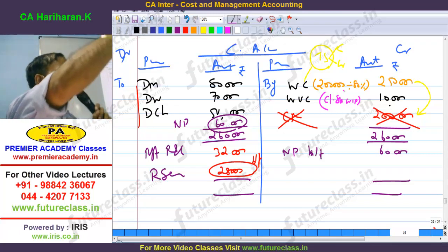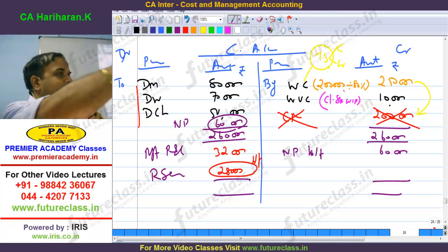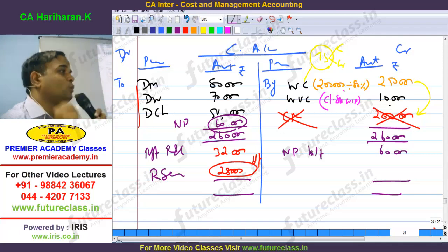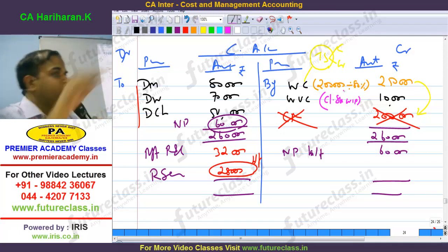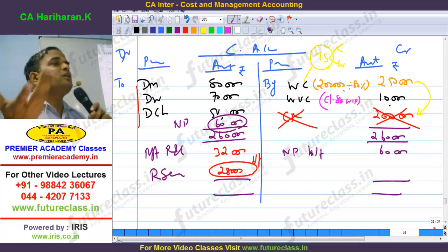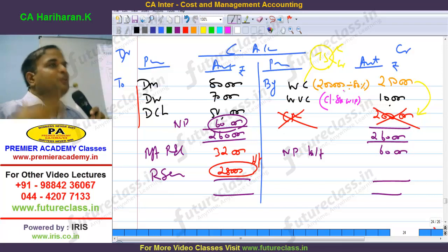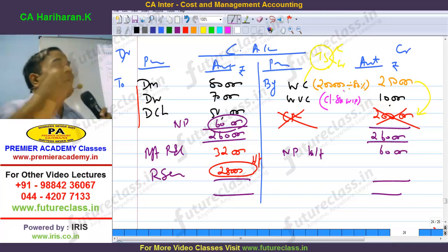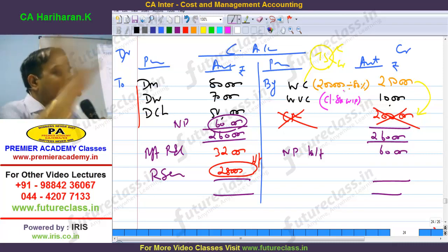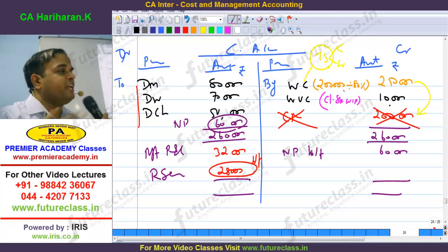Opening work certified is there. Opening work uncertified is there. So you have to watch meticulously. Then the treatment is the same as stock, right? Clear? Why is it called stock? I have completed it, but you are not satisfied, therefore it is at the WIP stage only. If you accept it, only then is it a fully finished product. If it is WIP, it means stock. Stock means inventory.